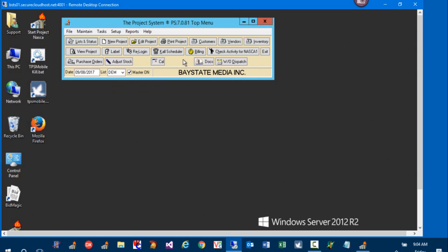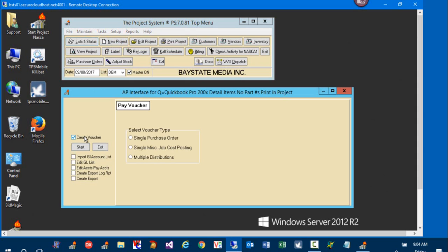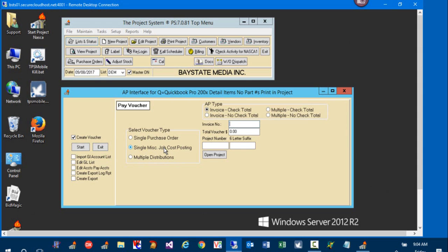Okay, now, the other transaction type is going to be a miscellaneous invoice. A miscellaneous invoice would be, our dear friend over here forgot to estimate a lift, and we need a scissor lift to put the light pole up. It happens. And we didn't generate it on a purchase order, so I can come over to this one. This would be something that there was no purchase order for. You get a raw invoice for a lift, which is the classic: equipment rental, core drill, all of that. Ditch Witch, all the above.